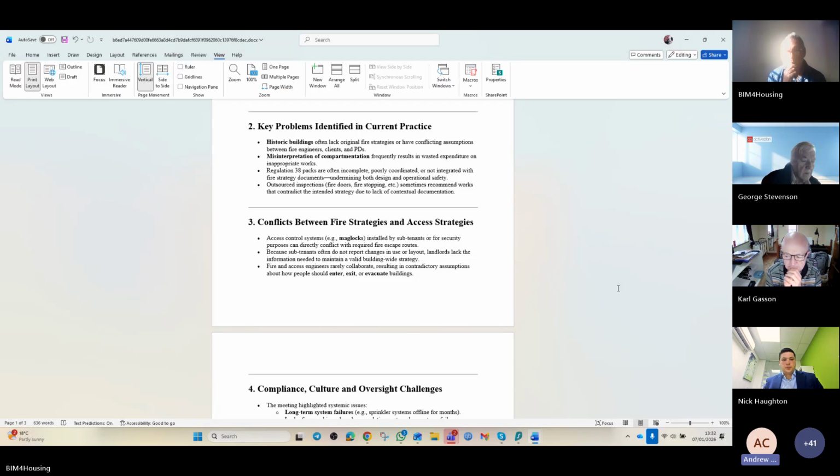And then you realise actually it's not been procured. It's very much a basic package that's been delivered. And I think we're in a situation now where I'm saying we need to be very clear, as me and the business I work in need to be very clear and detailed in our contractual obligations what we require as a deliverable from the developer. That has to include a full suite of information, at a granular level even, because if you don't ask for it, it's unlikely you're going to get it. And if it's documented and you don't get it, at least you've got some recourse.